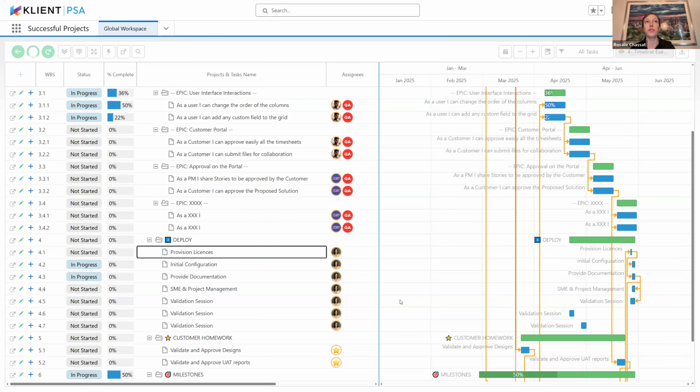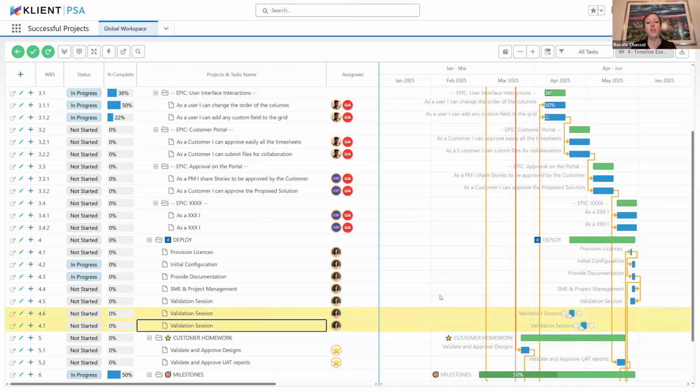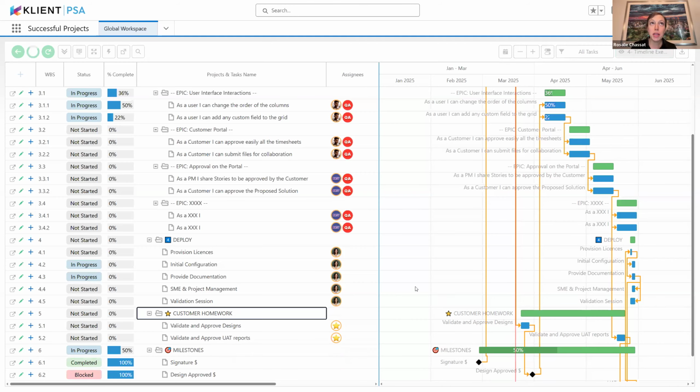Yeah, and one thing to keep in mind, the copy pasting is really nice, but there may be other options for you if copy pasting is not the one. For example, you may be better off using our task templates for certain things. Task templates will keep those dependencies and checklists and all that. So just keep in mind you have task templates as an option as well.